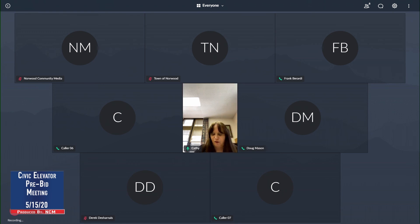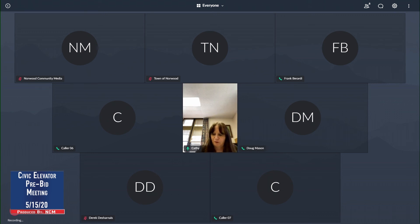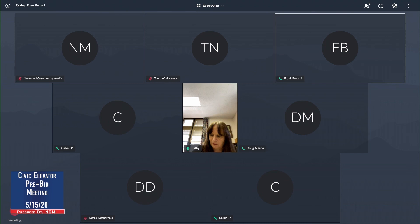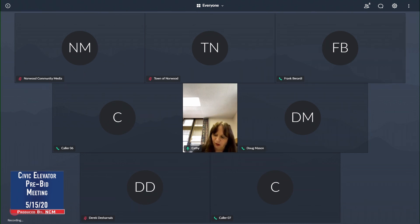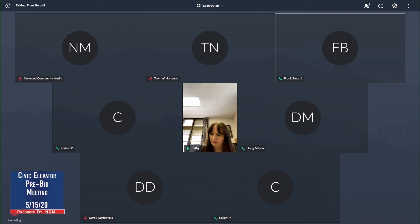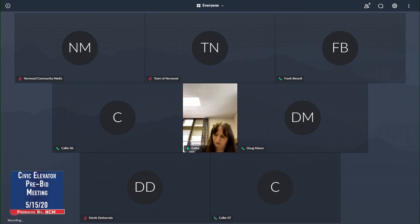So, I'll open it now for questions. And please identify yourself when you have a question. Mason, Brightlight Electric. Who owns the sump pumps? Who owns the HVAC equipment? That should be the mechanical contractor. And the mechanical is going to be covered under the GC? Yes. You'll be required, you own the connections, but power it up. But as far as the actual equipment itself, that should be provided by the mechanical. And just to be clear in my mind, the reference was made to an elevator recall panel. What you're looking for is an addressable fire alarm system to tie to the elevator control panel that's furnished by the elevator people.